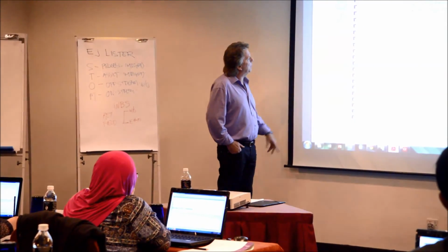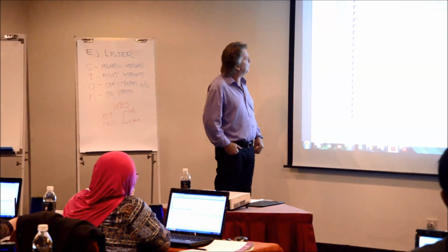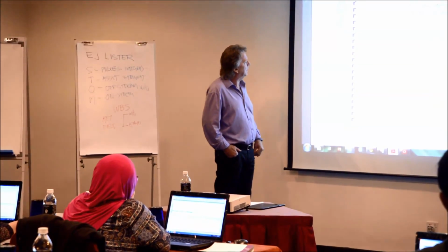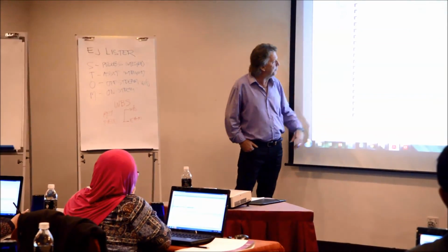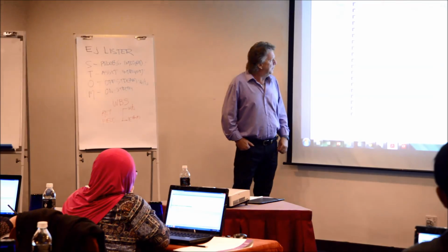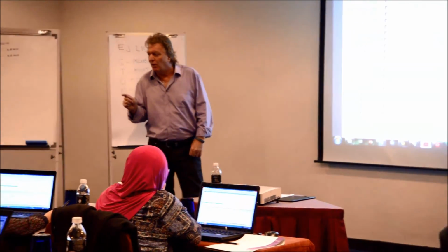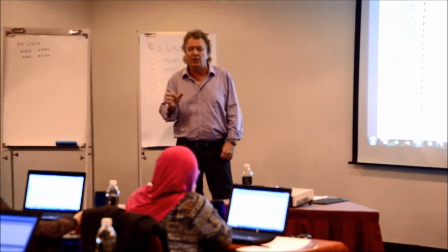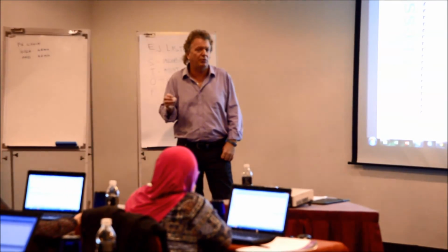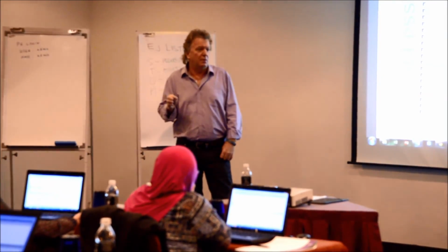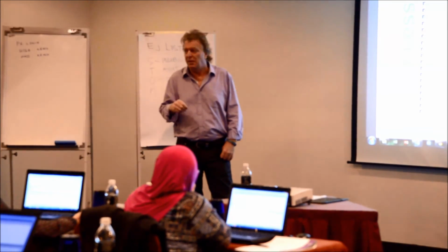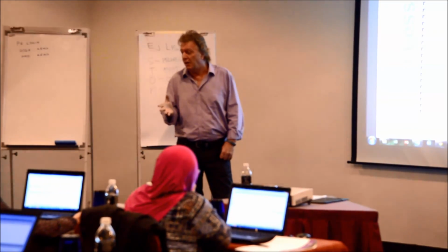Then we'll work on creating the plan job package. And tomorrow we'll be more into resources and productivity. When you talk about wrench time, even if we get the 6 hours of wrench time in 10 hours, what happens to the other 4 hours? Do I pay for that? Yeah, I have to pay for that, but I don't earn anything, right?